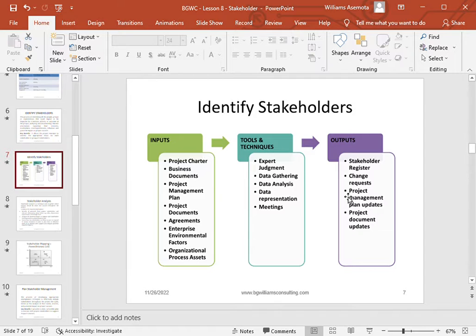That is it. And now, what are the different techniques that can be used to identify stakeholders? You can see them here. Expert judgment: you can ask the sponsor, excuse me, sir, who are your key stakeholders for this project? Who can I discuss with? The sponsor can say, okay, apart from me, you can discuss with Wale, Tunde, Debo. All right, those are the key. So expert judgment can help you identify the key stakeholders.